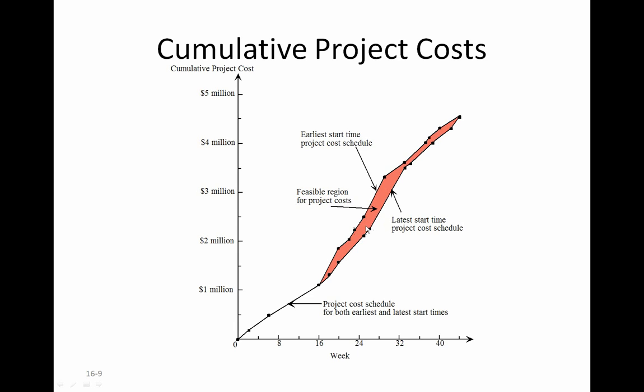If you borrow the money from the bank, if I do it on early start basis, I have to pay up early. But now for the same activity, if I schedule late, I would have some savings in the interest payment because I'm borrowing late, and I'm also paying when that activity exactly finishes. Okay, so that is the savings that I would accrue.